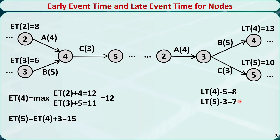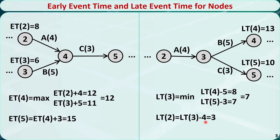So we have two options, and we need to determine which one to choose. We know that both activities B and C can start only if node 3 happened. If node 3 happens at time 8, although activity B can be finished without changing the late time of node 4, activity C is still not finished at time 10 because 8 plus 3 equals 11. So we need to pick the smaller number. Therefore, the late event time of node 3 should be 7. Now the latest time node 3 can happen is at time 7, and the duration of activity A is 4, so the latest time node 2 can happen is 7 minus 4, equal to 3.